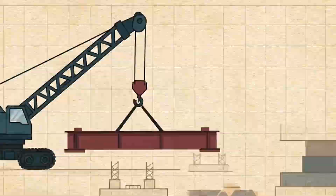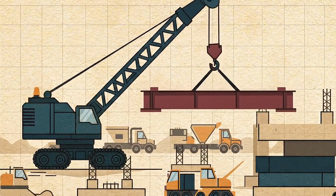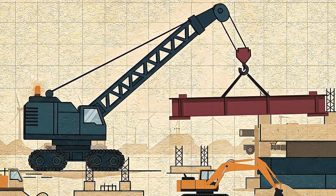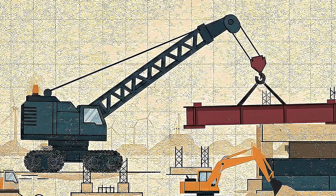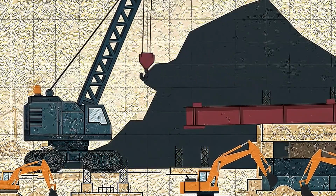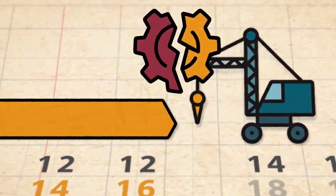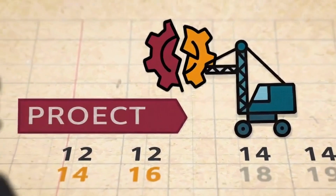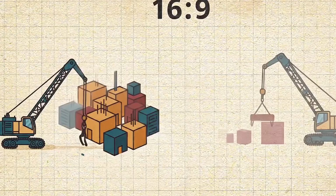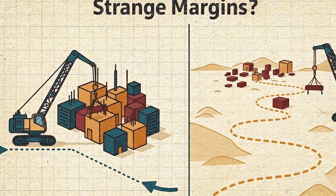The specific reason changes the contract question, so we should not pretend there is one universal rule. Who pays for the waiting? That question can be more important than the nominal rental rate because waiting consumes calendar. A well-written contract can transfer some of that risk to the customer. A different contract can leave much more of it with the crane company. And a gap between projects has no counterparty at all. The same parked machine can therefore represent revenue, reduced revenue, or zero revenue, depending on why it is parked. Public documents show that the answer varies. Federal Highway Administration guidance for force account work recognizes that equipment owners continue to incur ownership costs while equipment is required to stand by.